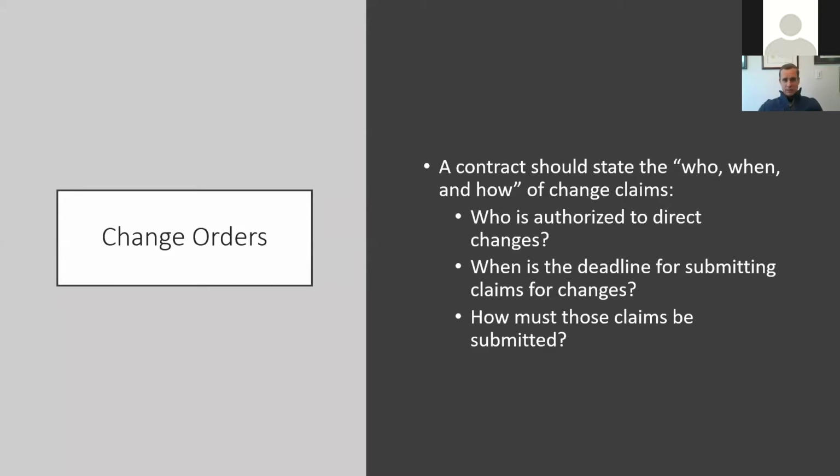Don't wait to the end of the project to submit a bunch of change orders and say, oh yeah, 3 months ago, I encountered the load-bearing wall. Here's the change order for that. When there's a contract that you signed that says you need to present at least notice that you intend to seek compensation, you might not have all your numbers ready yet within 48 hours, because that's an enforceable provision.